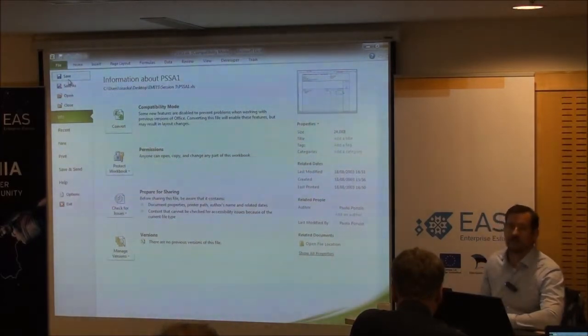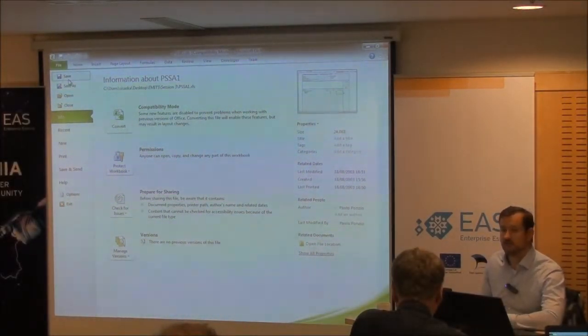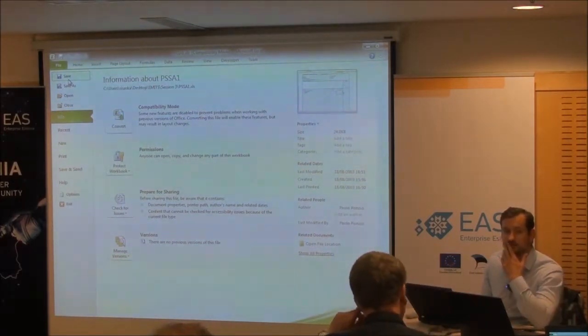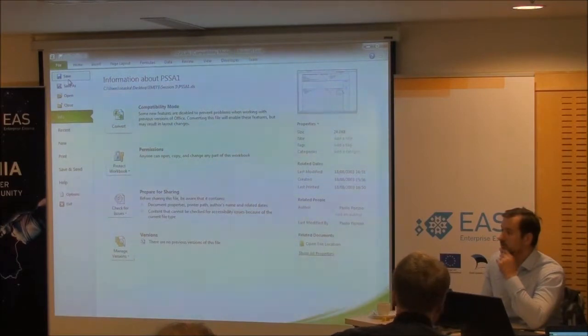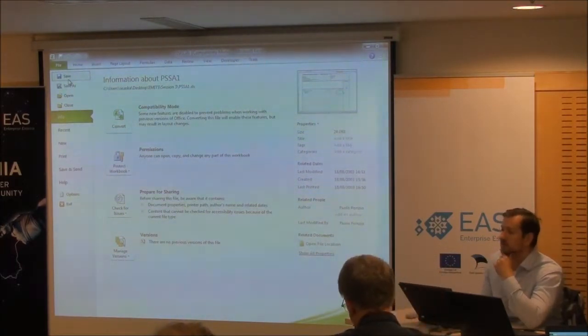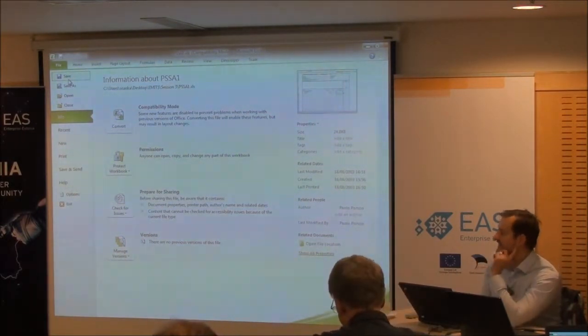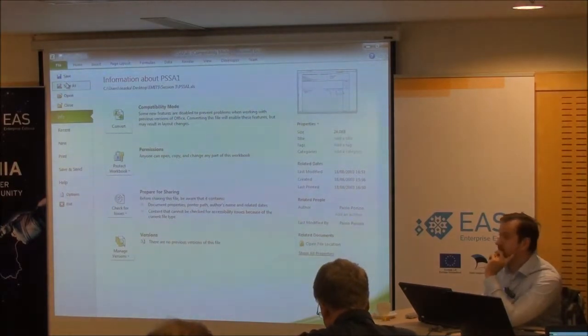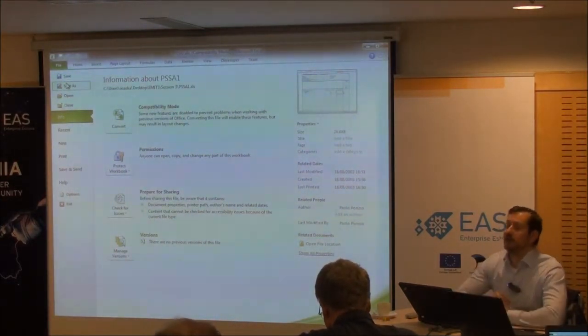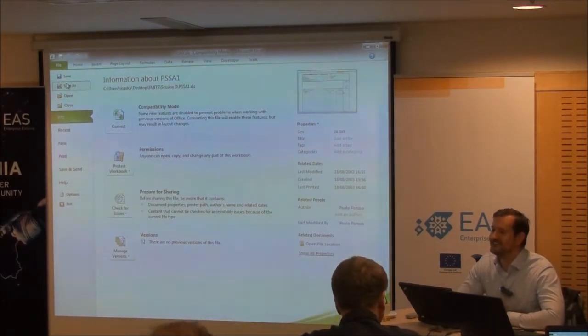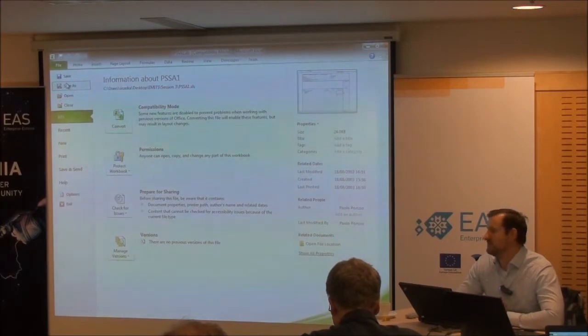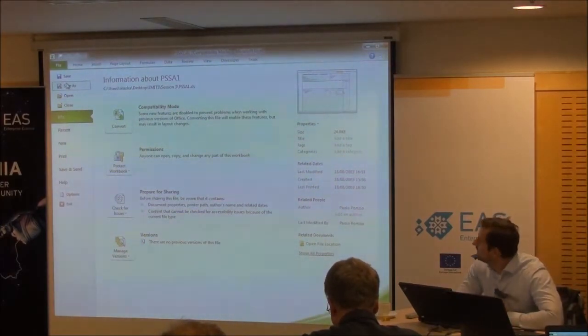Is everyone doing this? Otherwise, I'm quite happy to save these ones because there'll be some formula added, and then maybe they can make them available for download. But if everyone's doing them with me, then you don't need to. But if not, then I can save them now. What does 1.4 mean? Because what we're doing there, you've got 40% overhead, right? The rate's going to stay, so there's your 1, and you've added 40% to it. So that's where that's coming from.